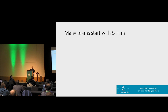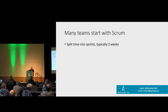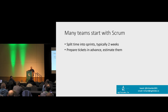A lot of teams start with Scrum. It's very neatly packaged. If a team wants to switch towards being Agile, Scrum is an easy place to start — there's the Scrum guide, it's a prescriptive framework. You split your time into sprints, typically about two weeks. In that sprint, you do a bunch of tickets that you prepare in advance — sometimes called grooming or planning. You normally estimate them to figure out how much is a reasonable amount of work to fit into the two weeks.